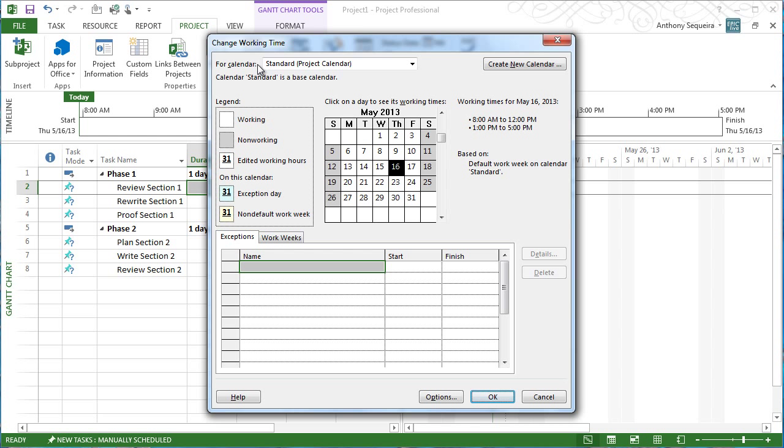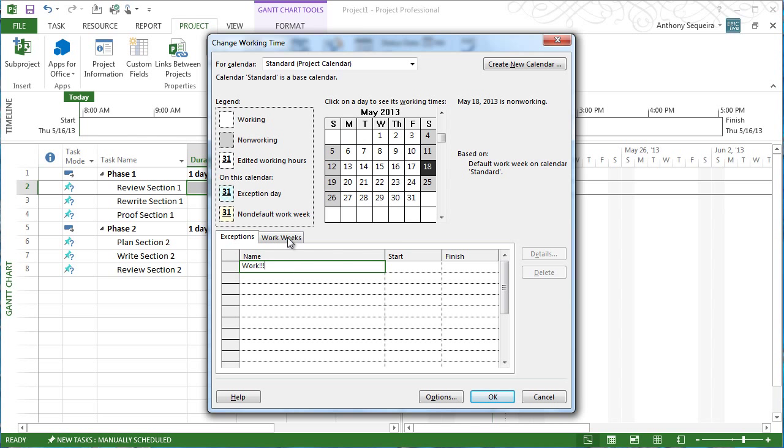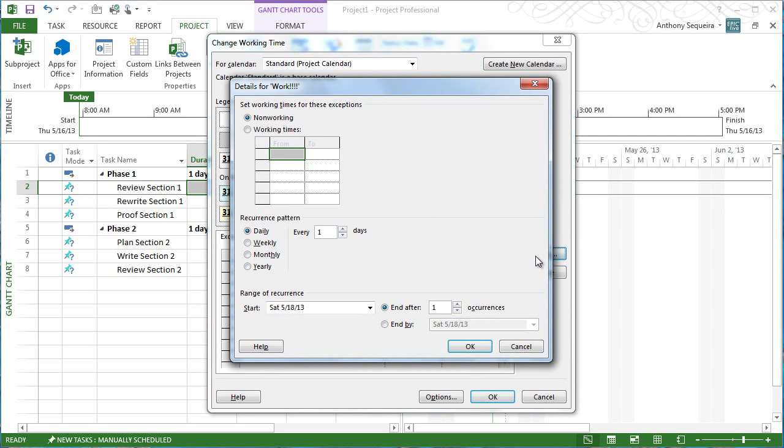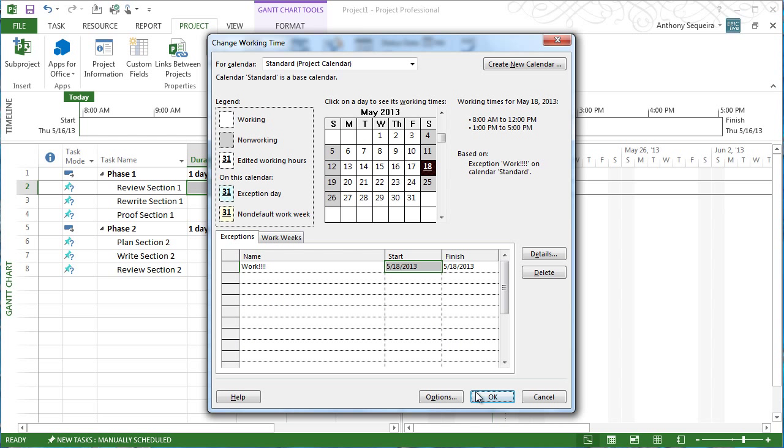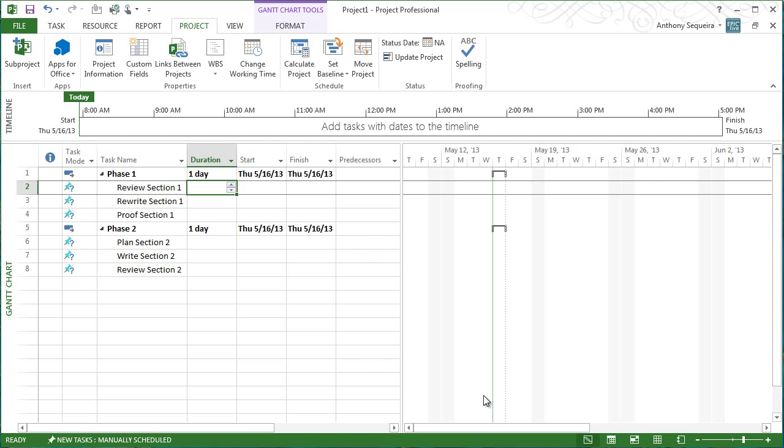I know there's a huge bonus at the end of this, and I'll tell you, it's well worth it to me to go ahead and work this upcoming Saturday. So, I'm going to go ahead and select this upcoming Saturday, and I'm going to say, this is an exception. I want to work. We're going to go into the details of that particular day, and I'm going to set my working time. I'm going to go ahead and work a full eight-hour day on that particular Saturday to help get this project done. All right, here we go.